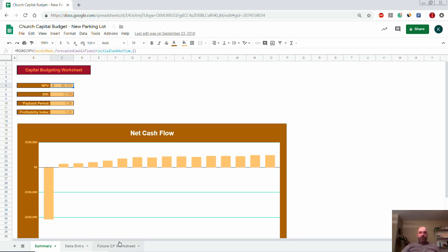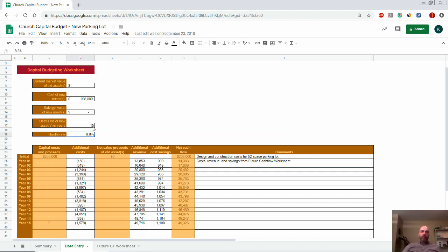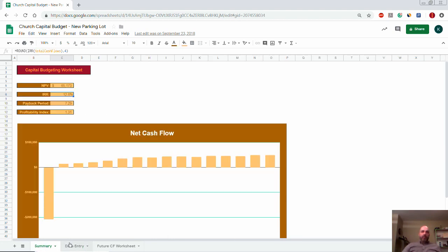Internal rate of return is, for all intents and purposes, a different way to look at the same concept as NPV. IRR, internal rate of return. Basically, this is the hurdle rate that would make the project's NPV zero. Let me rephrase that. If your project is positive, then your internal rate of return is going to be higher than your hurdle rate. Okay, I always do an example here.